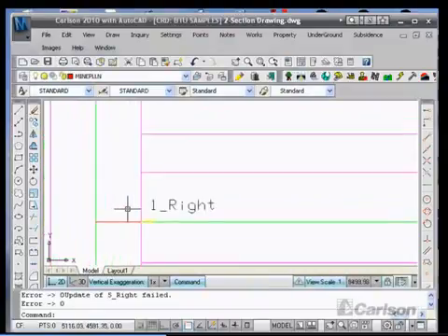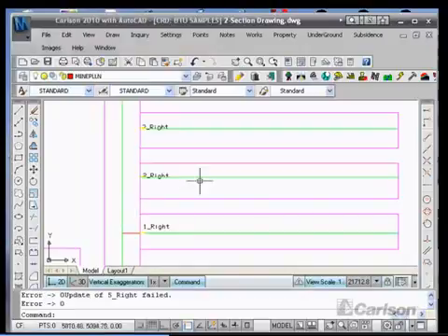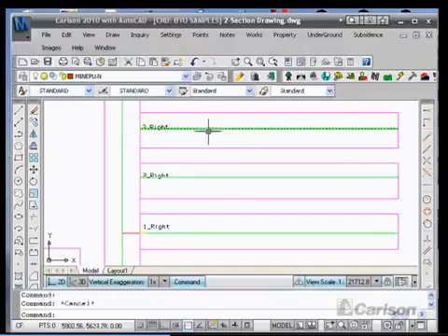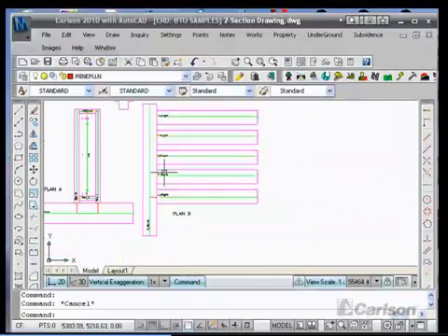When you place a panel using the place panel, you get this red lead, which automatically determines a precedence so that this panel must be mined before this one can. When you place panels using Auto Place Panel by Text, these panels are placed as a group, but there's no precedence between them, so you'll have to enforce the precedence with your sequence, or you can also define the precedence